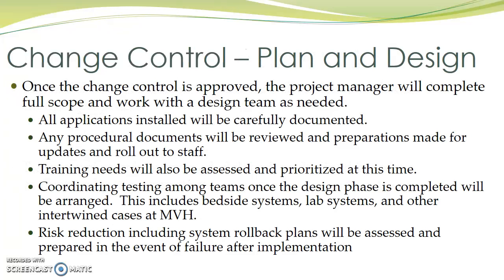Change control, plan and design. Once the change control is approved, the project manager will complete full scope and work with the design team as needed. All applications installed will be carefully documented. Any procedural documents will be reviewed and preparations made for updates and rollout to staff. Training needs will also be assessed and prioritized at this time.